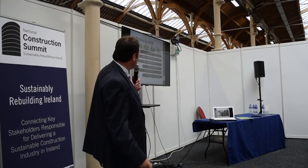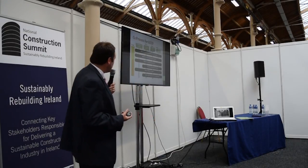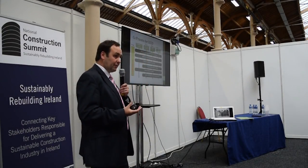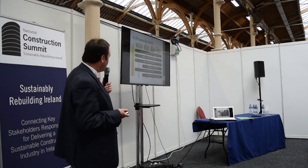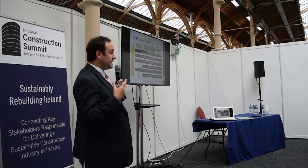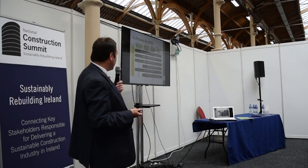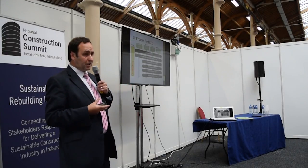Then continuing through construction, there's a review once the checklists have been carried out by the subcontractors, to verify that the performance tests have actually occurred, and LEED will recommend doing a sampling-based testing rather than test everything, have a qualified sample base. All issues must be documented from a LEED perspective, regardless of whether it's fundamental or enhanced commissioning. The final systems manual then gets compiled, and a final commissioning report. If the commissioning plan is done properly, it actually forms the core of the final commissioning report. Then there's a verification process that all the training has occurred, and then you're into the final occupation of the